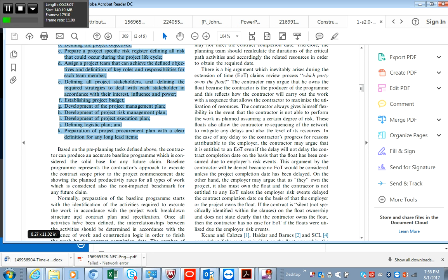So in the contract, if it says that the main contractor carries on the works from stage 4 conceptual design, then the risk is being borne by the contractor. Okay? The reason for that is, if you're novated over at stage 4, that means the development of those drawings to suit the locations in which they're going to go will usually happen from stage 4 to stage 8 during the pre-construction phase, right?